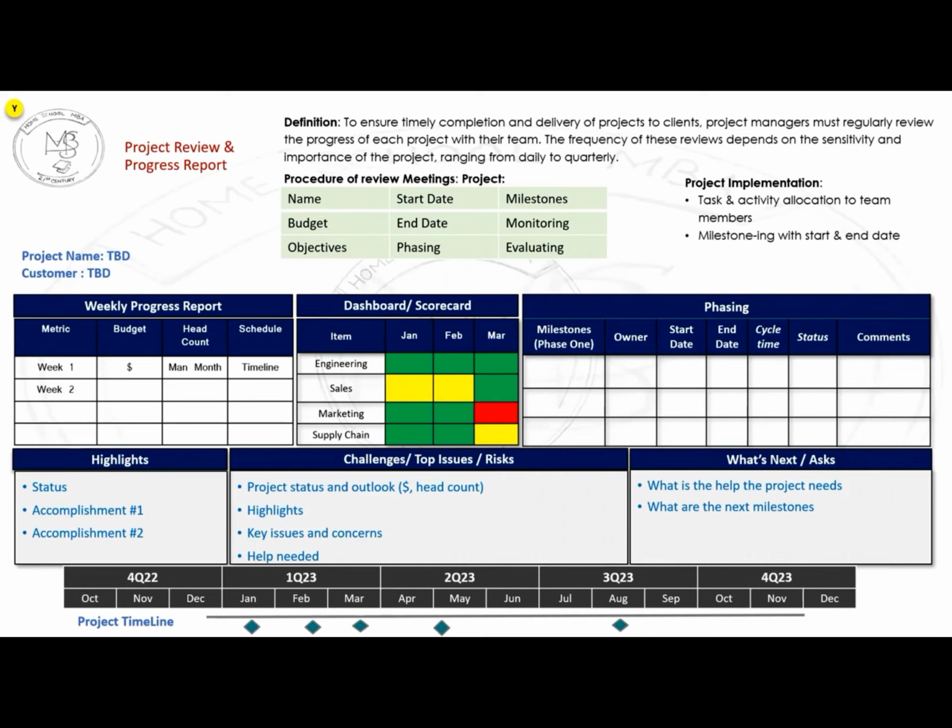And the other important thing that you have to make sure is that the budget is provided to the team, because responsibility and authority go together. You can't make some people responsible but not give him or her the authority. And when we say authority, it means to use the budget, to use various finances for procurements or for day to day expenditure and things like that.